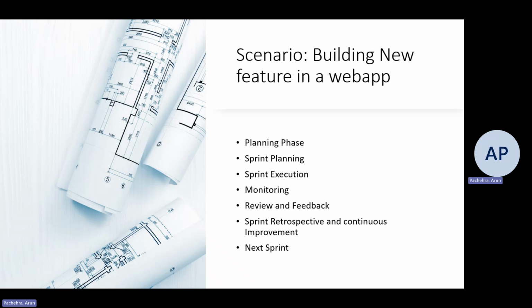It's an infinite loop, right? So at the end of the sprint, the team reviews completed work with stakeholders, and work item linking will happen here. The team links the work item to the corresponding code commits, pull requests, and builds in Azure Repos and Azure Pipelines for traceability. So whatever work is done, we first gather all the work, then pick the high priority, then divide it into smaller tasks, then assign the team members.